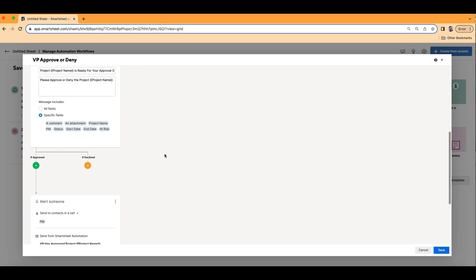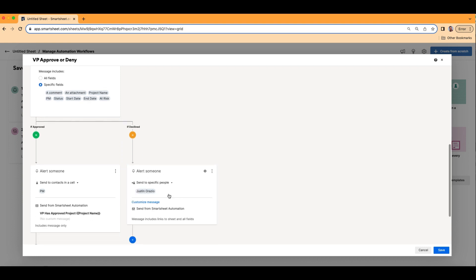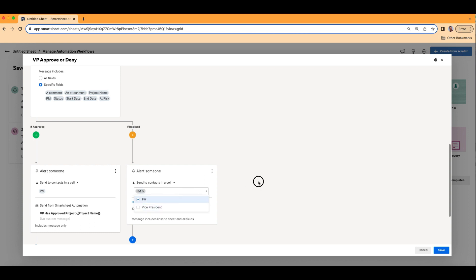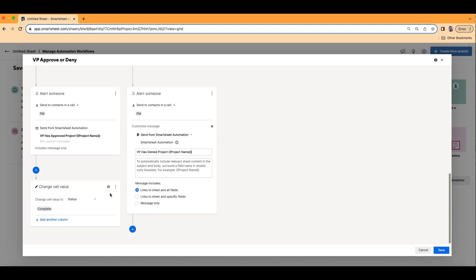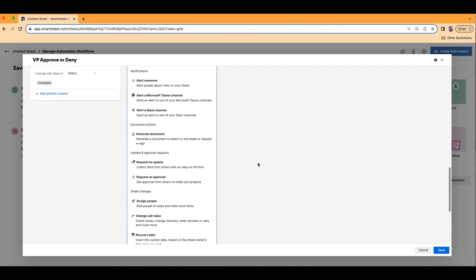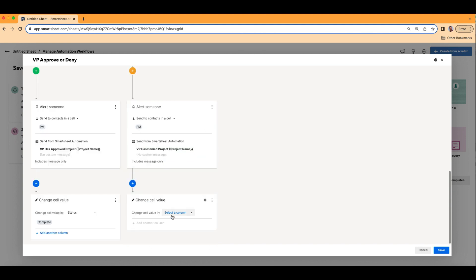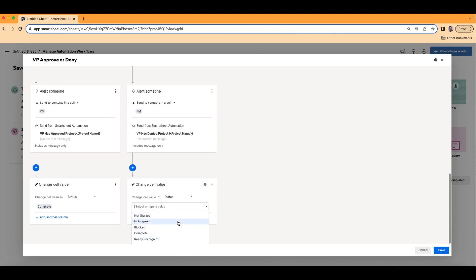The last thing here is we need to choose something if the VP declines it. Click here, add action. Maybe we want to notify the PM — we don't want to send to a specific person, we want to choose a contact in the cell. We'll notify the PM. This time: VP has denied {{Project Name}}, whatever the project name is in that row. And maybe the status now goes back a step — change cell value, choose Status — and maybe instead of Ready for Sign Off, we go back to In Progress.